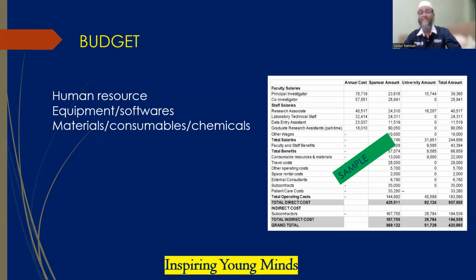Okay, so you cannot increase or decrease the funding budget. That is the correct way of getting your price, quotation. That's why you need an appropriate amount of lead time. Now you are going to submit your proposal tomorrow, and now you are going to get a quotation? Impossible. These are bad planning. These are wrong planning. So that's why you need lead time.